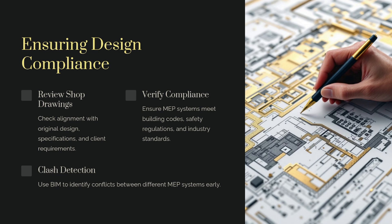Under design compliance, we have: review shop drawings, verify compliance, and clash detection. So what is the review of shop drawings? Basically, before the drawing is approved or before submitting to your consultant for review and approval, you also need to check how the route is going to happen at site. If you find clashes or any issues, you can review and inform the concerned team for changes. In the section drawings, you need to ensure how the cable tray, duct, or chilled water pipes are routed at site.